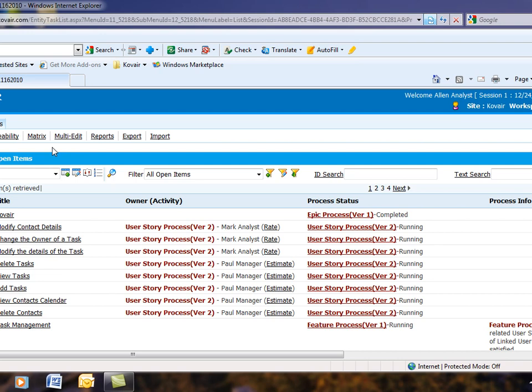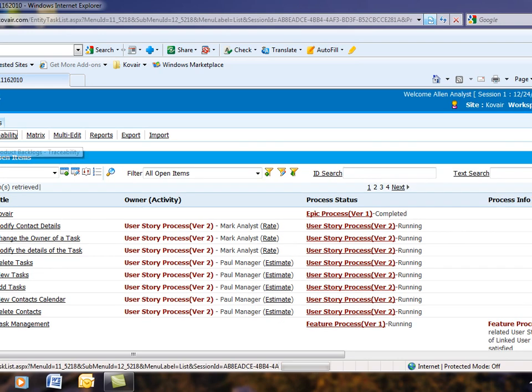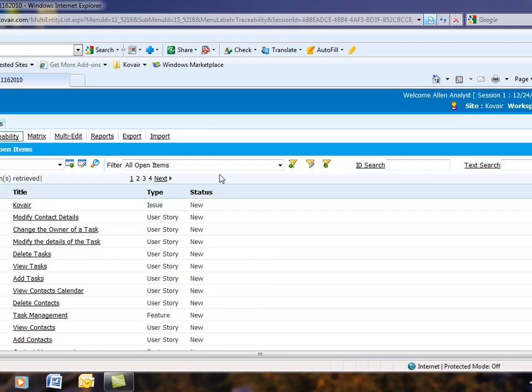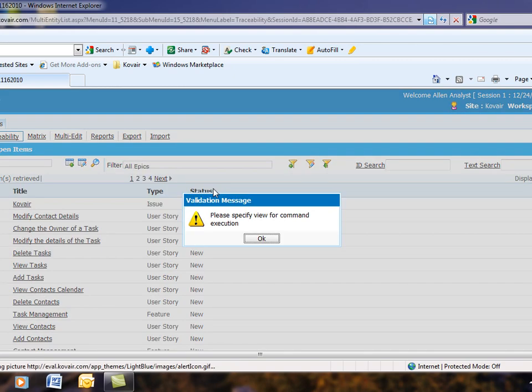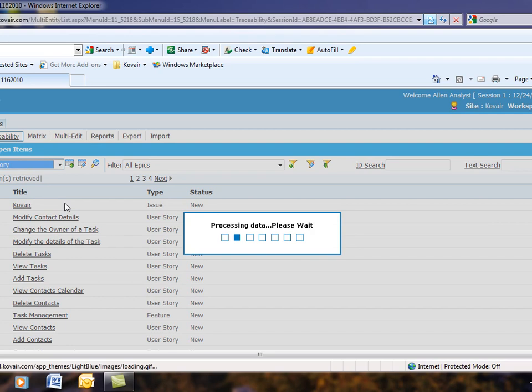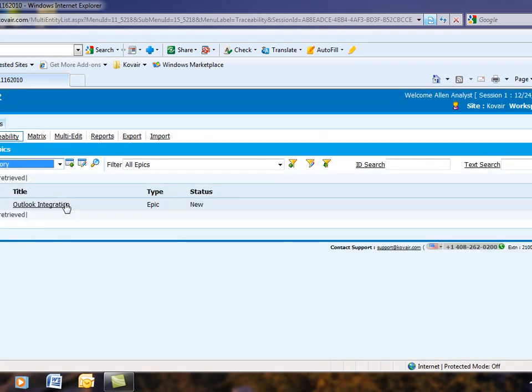These user stories are eventually being estimated, rated, and these are eventually worked on by assigning them to the corresponding releases and further into smaller sections, which are sprints. So if you now notice over here, if we look into this particular epic, let's say we select this particular hierarchy, that's epic to feature to story.